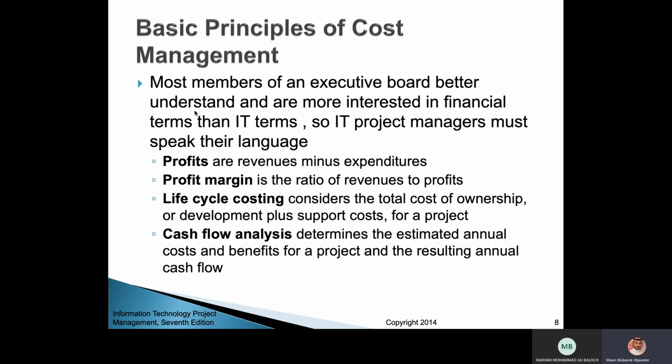And then you're going to receive the money based on your progress on that timetable, or the timeline that you specified. So if you distributed this 1 million over, say, 10 months, and you distribute it evenly, just for the sake of this example, it will be 100,000 each month for 10 months.